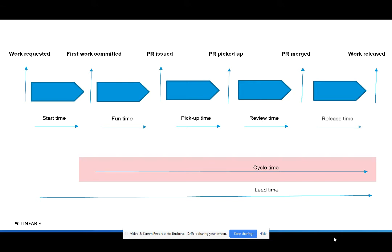After the branch has been merged, the time it takes for it to get released, we call release time. Merge time is another important indicator, especially for some organizations that have continuous deployment — their merge time is effectively their cycle time.